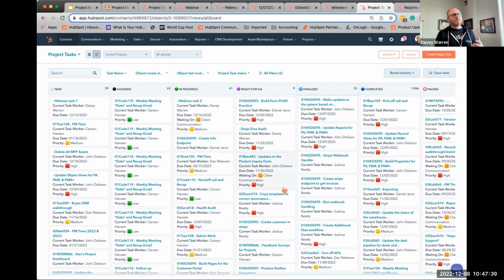A lot of the things that we've overcome, things that we've changed, is we realized that people were seeing it and they didn't know if they were supposed to work on it or not, because they had to keep asking for a different ownership, like, am I the QA owner or am I the task owner? And so we just updated it to say, based on the status, change the current task worker to who it needs to be. And then they can just filter by current task worker and see their own board for the day of what they need to do.